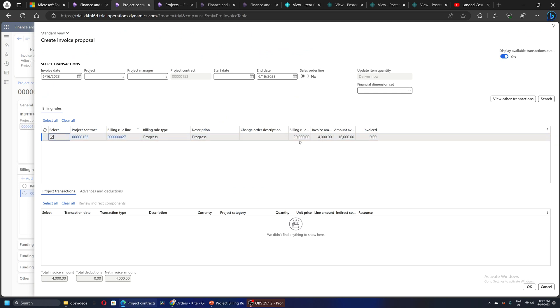Out of the contract value of $20,000, 20 percent, which is basically $4,000, I can invoice. I will go and say OK.